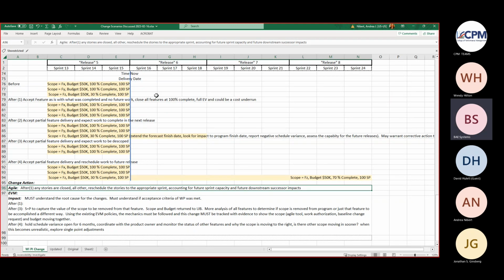I think I would want to be removing those story points. When I go back and look at actuals for the work that I completed, I want to know my real story points because I want to know my hours per story point for forecasting and bidding. I wouldn't want story points for which I never actually executed effort. That's my thought. Got it.